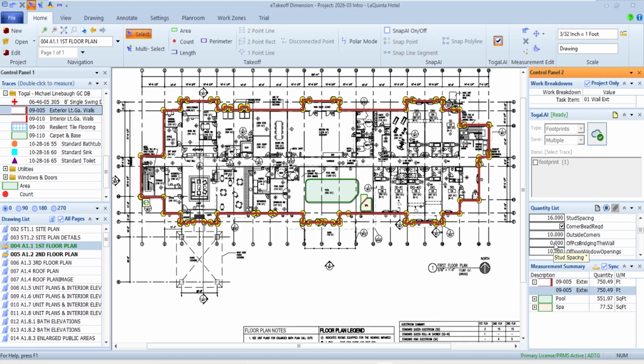In real life, this would go a little slower, because some of these walls may be 10 foot and some 14 foot, and you'd probably break each height off into a separate run so you can do the dimensions. I'll do interior walls in a couple of different passes. But for my exterior walls, I've got my label so I can group these items, and I've gone through all my assembly questions. Everything's good with that wall at the moment.